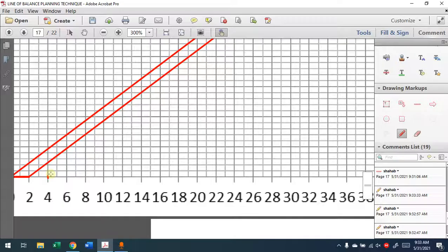Now, in order to understand these possibilities, we have to know rate of build. Now, rate of build, before going into the drawing, expresses the way that the line is standing. If rate of build is high, then the line will go vertical. Remember this one, please. If rate of build is low, it means the line will come to a horizontal manner.